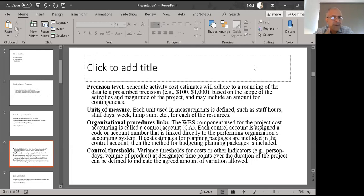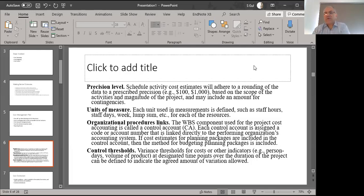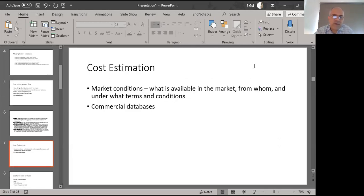For example, if our plan is to spend 50 dollars on dinner, are we going to get worried if the bill rises to 51 dollars, or only when it rises to 55 dollars? That threshold value — after which we say things have gone out of control and action is needed — is the variance threshold. It forms an indicator for us at which point we start worrying about actual expenses incurred. We think about these threshold values during planning, and when execution begins, they become points of action.